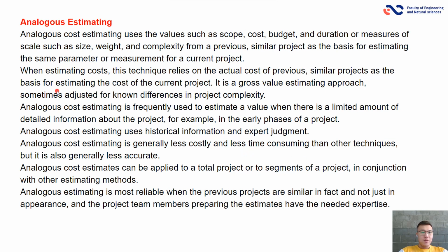Analogous estimating. Analogous cost estimating uses values such as scope, cost, budget, and duration, or measures of scale such as size, weight, and complexity from a previous similar project as the basis for estimating the similar parameter or measurement for a current project.